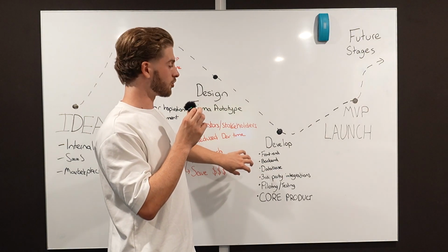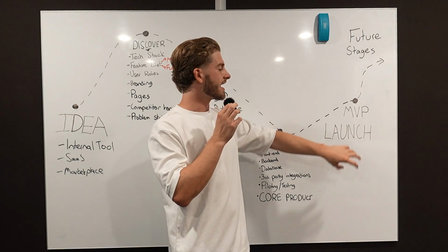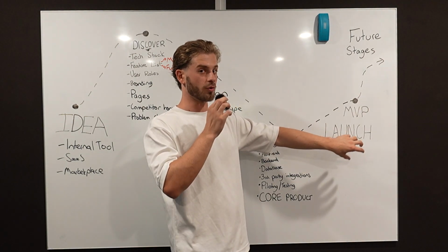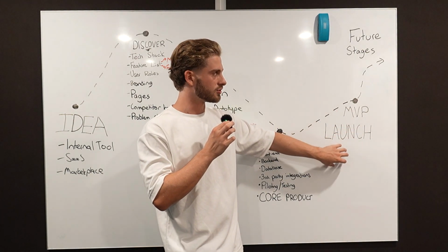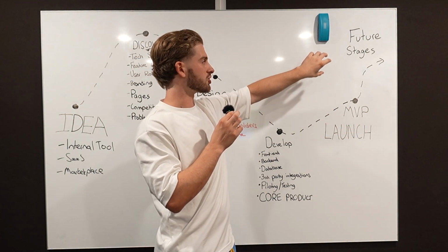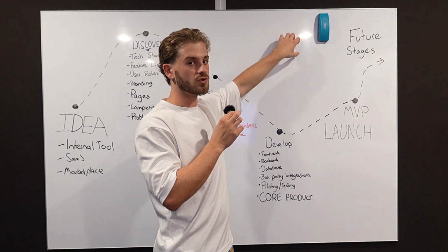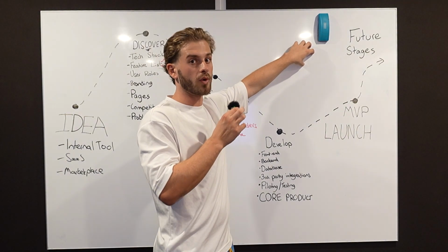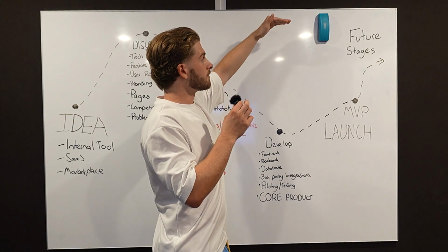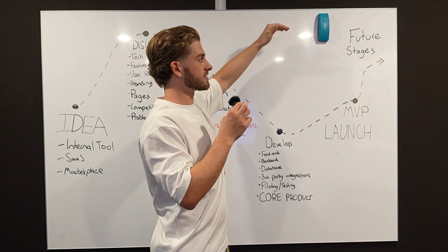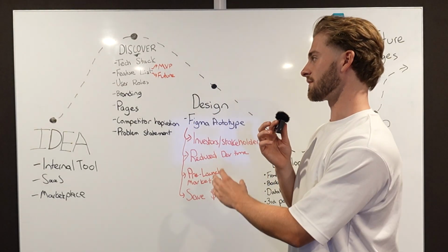Once we've developed that core product, we then deploy it to live as our MVP, and we try our best to onboard some real paying users. Using the extremely valuable feedback that we get from these paying users, we iterate on the product, we try and get a stable product out there that solves the problem, and then we stage all of the future feature improvements or requests from these users into priorities, and we deploy those systematically as we further develop your product.